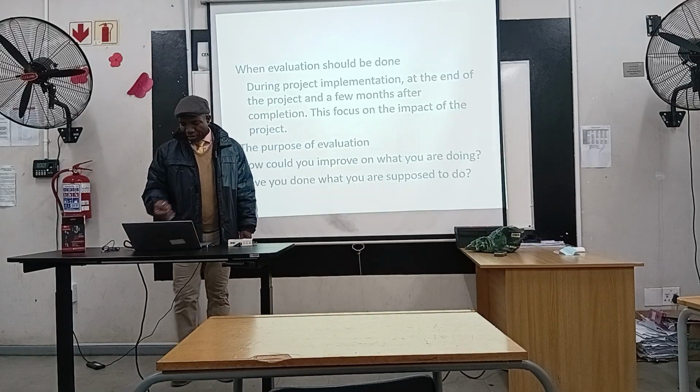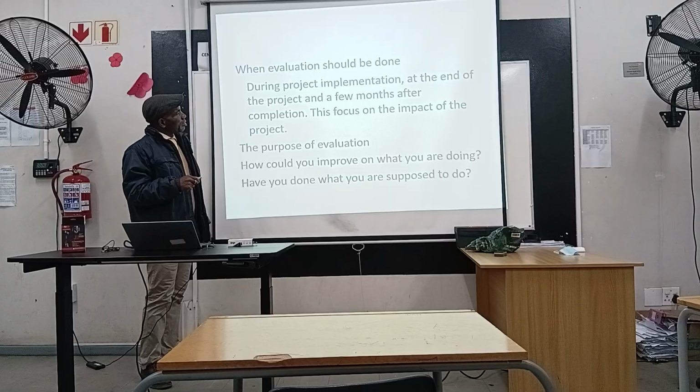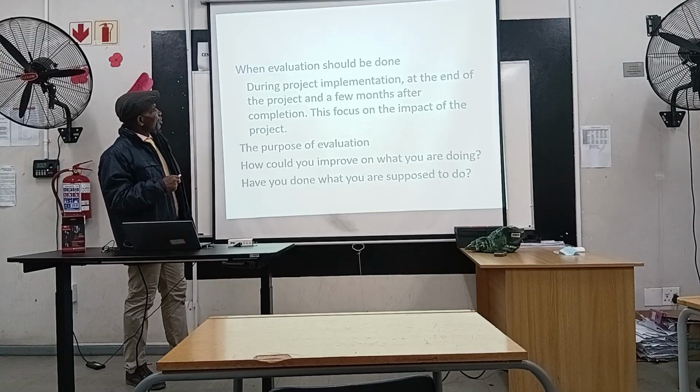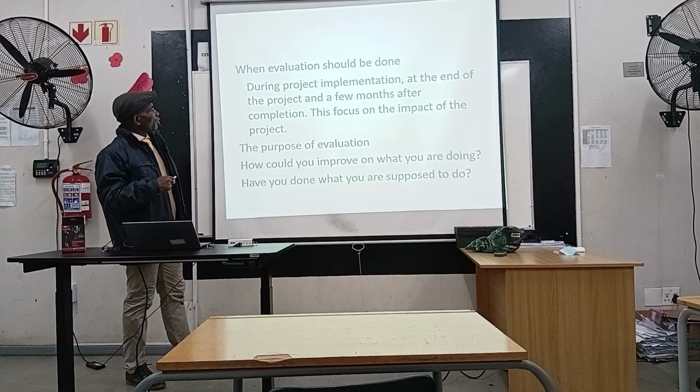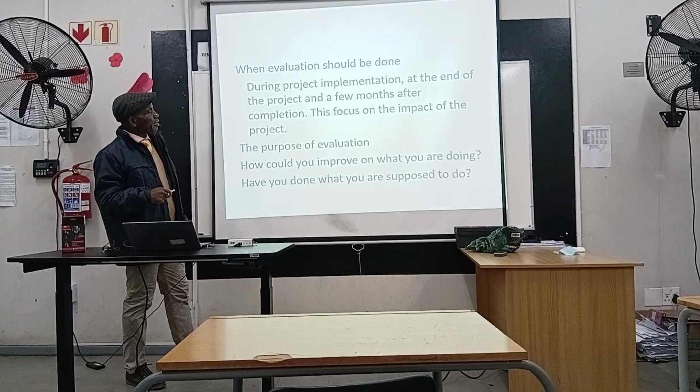You've got three times that evaluation could be done in a project. One, during project implementation. The second one is at the end of the project. The third one is a few months after the completion of the project.